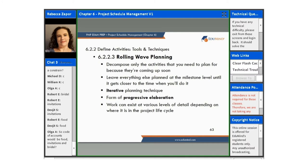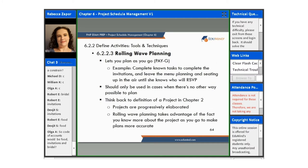Work can exist at various levels of detail depending on where it is in the project life cycle. Rolling wave planning lets you plan as you go. An example would be if you complete the known tasks to complete the invitations and then leave the menu planning and the seating until later when you know who's going to RSVP.